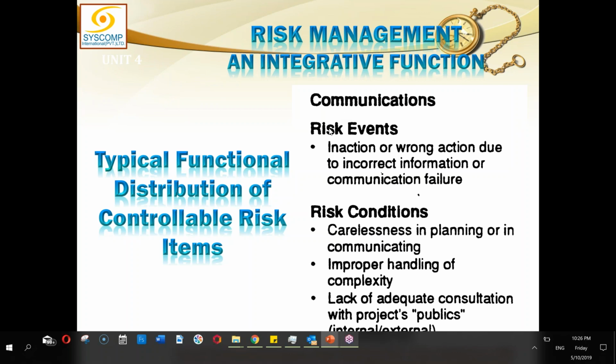In communication, what could be the risk? Inaction or wrong action due to incorrect information or communication failure. Risk conditions could be carelessness in planning or in communicating, improper handling of complexity, lack of adequate consultation with projects, public, internal and external.